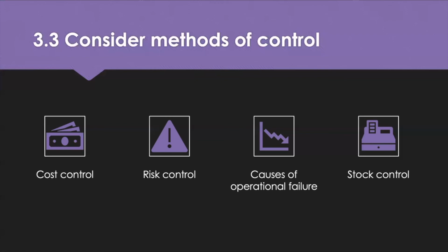So many organisations control cost via their purchase contracts, and the strategies could be looking at things like fixed price contracts, variable price contracts with notice or a cost maximum, linking cost to a national, international or industry index, open and transparent costs or gain share arrangements, or even looking at fixed exchange rates or dealing in only one currency.